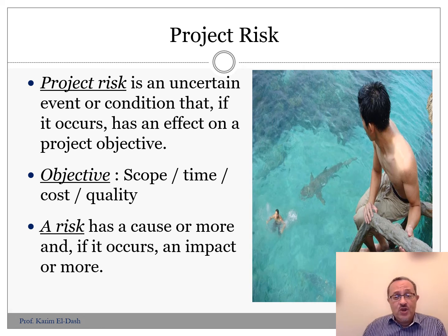So simply, if we are going to finish that before the deadline, before 12 months, that's an opportunity. How can we exploit it? If we are going to finish that in 14 months or even 13 months, that's a negative risk. That's a threat for the project. We may pay a fine for being behind schedule. So in this case, we have to pay a penalty for the delay. So we are in cost risk and time risk.